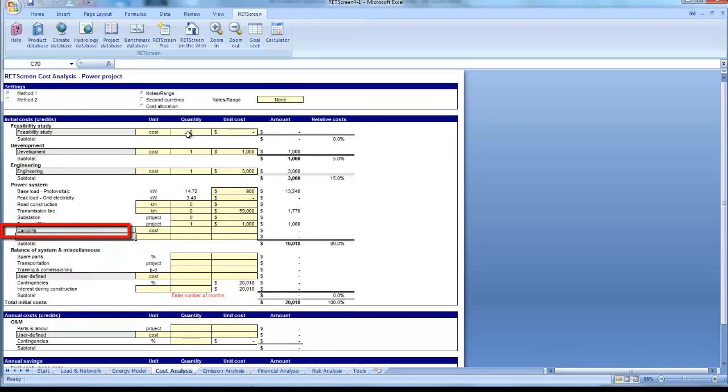Each unit protects 2 cars and offers space for 29 meters squared of panels, which is plenty for the 46 modules we will need to achieve 14.72 kilowatts of capacity. 3 units could actually hold up to 86 modules for a total of 16.96 kilowatts of capacity. A RETScreen simulation shows that increasing the panels to use all space available actually increases the NPV by $12,500 and the IRR by 0.6%. So, we will assume full use of the carport space with 86 modules sheltering up to 6 cars underneath. The manufacturer has provided a quote of $6,701 per unit.